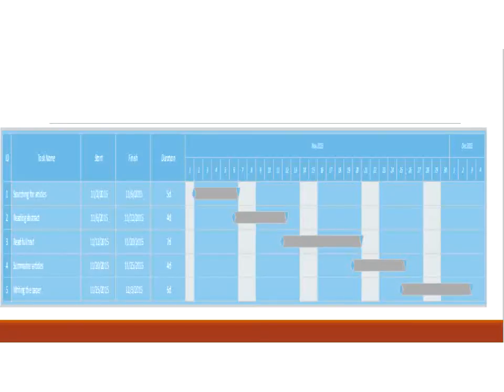of my research paper. When I did it, I had to organize myself to search for articles, and I gave myself 5 days. You can see the 5 days labeled. After that, I had to read the abstract, and I gave myself 4 days to do that. After reading the abstract, I said I need to read the full article. Probably this will need another week. Summarizing the article took almost 4 days. And then writing the article took almost 6 days. I managed to finish on time. I gave myself a month to do it.